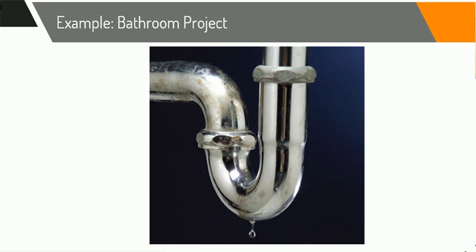So basically he will be giving the scope of a new project, which will be a renovation of the bathroom. The scope will be changing the pipe. The budget will be some amount like $100 or $200. The time will be about 1 day. The quality will be ensured, with a good quality pipe that will work for some years. So he gives the new project details to the owner in a simple manner. If the owner accepts the scope, time, and cost, he will approve the project and a new project will start from the initiation.